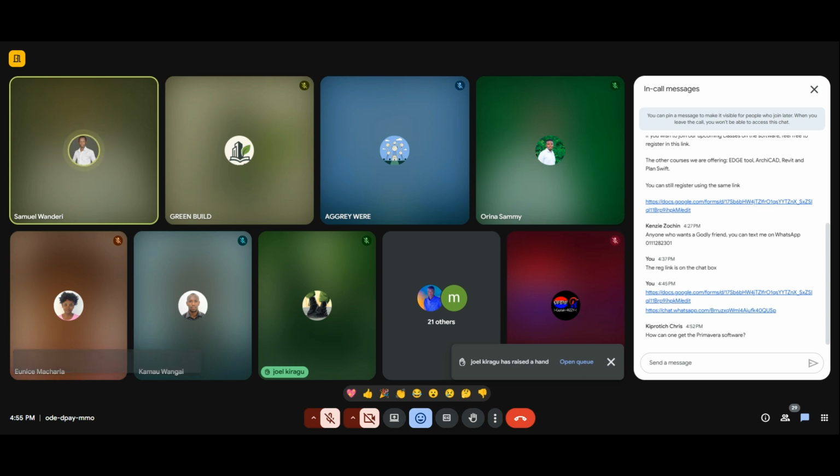Now you get the main activity, and you break it down smaller and smaller to the very last task as you assign time. Also, another mistake is on how the tasks follow each other. You can't talk of the construction phase when the pre-construction phase has not started. So when you are doing your scheduling, you have to factor in the timelines. I think those are the common mistakes that most people tend to make.